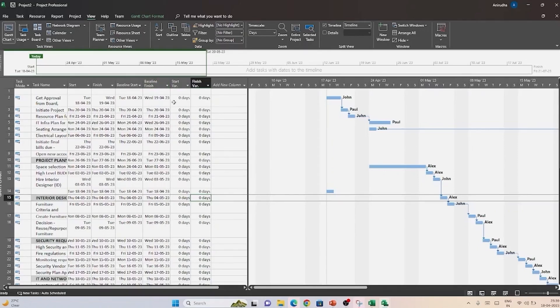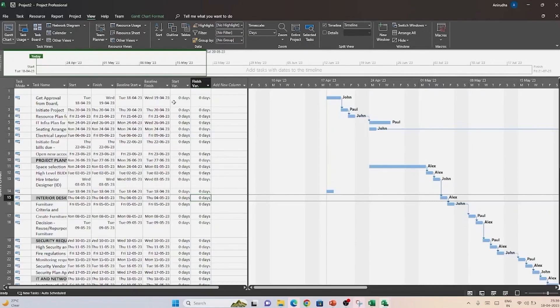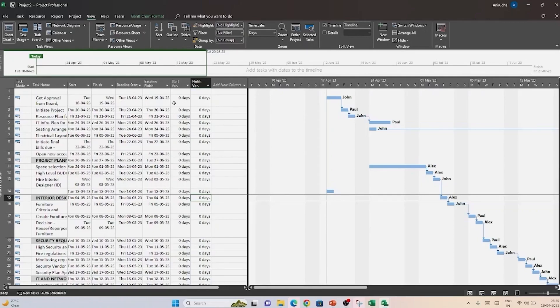Because now we see the baseline column start and finish which is here baseline finish and baseline start have been populated. Though they now show the same values as your planned start and finish, in the future when there are inevitable changes to the schedule, you can actually understand the performance of your schedule because you will now have something to compare against. You can also keep on creating multiple baselines throughout the length of the project. Let us keep these baselines open as of now. So, the conclusion to this whole thing is that the baseline can be a very important aspect in your Microsoft project because it is going to show up a timestamp value for your comparison with the future values.